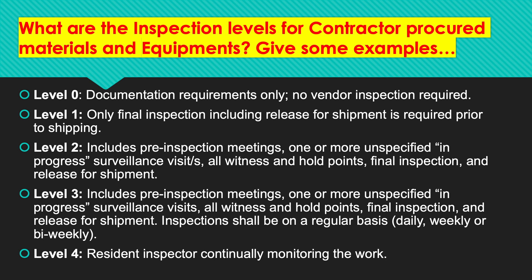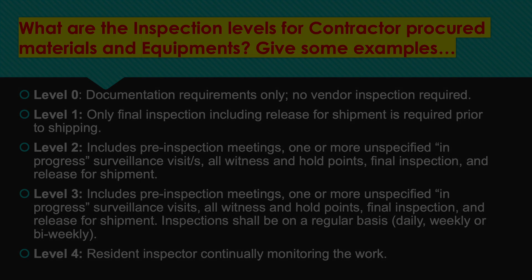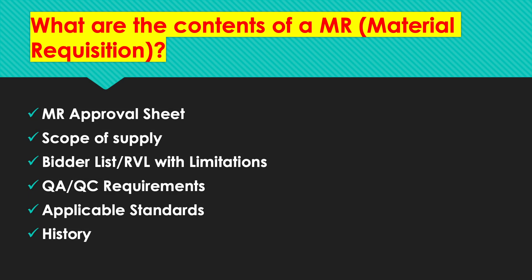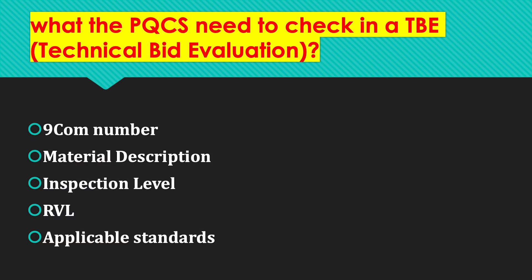Who will prepare the MR? The engineering team will prepare the MR, and it has to be reviewed by the Procurement Quality Control Supervisor (PQCS). What are the contents of a material requisition (MR)? MR approval sheet, scope of supply, bidder list or regulated vendor list with limitations, QA/QC requirements, applicable standards, and history.